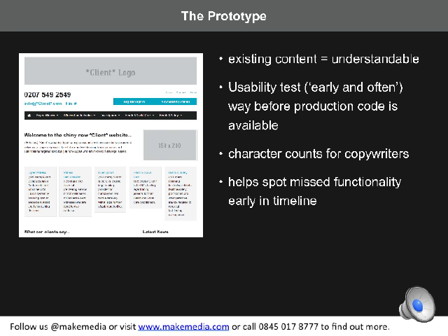And what's great about this is that, one, you can usability test the prototype, so you can take it out, it's got the content in place for you to do this, and you can quite easily and early check what's incorrect about all those design decisions that you made. And we spent a lot of time reviewing this with the client as well once we'd usability tested it, and we spotted quite early on that the client had missed out a couple of key aspects in their briefing process. So, 10%, 20% into the timeline of the project, we're already starting to see stuff that we've missed out, and it's a lot better to find that stuff out that early on than it is to find it